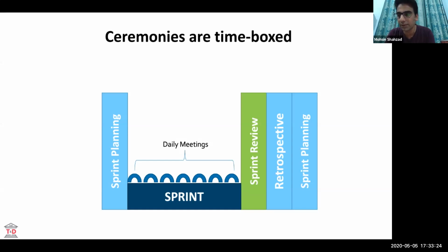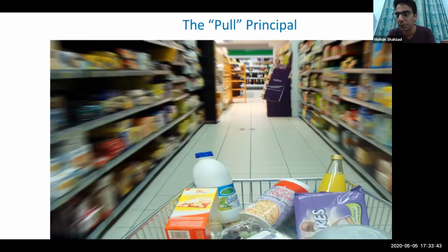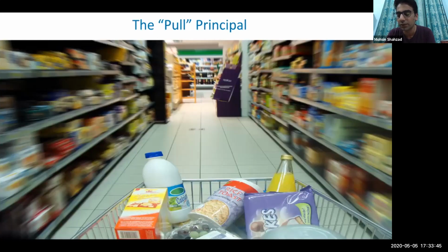So in Scrum, you need to create small iterations to do any work. Those iterations are called sprints. A sprint is a quick run, a short run. A maximum iteration of a sprint can be 30 days or less, not more than 30 days. So this is the same thing. And there is a pull principle, that the team working in this framework will be pulling their work. No one will be assigning them.